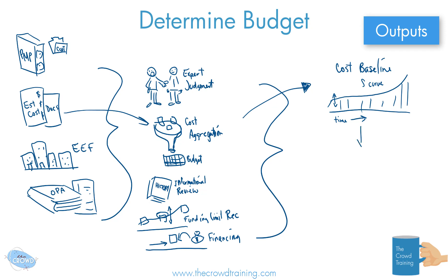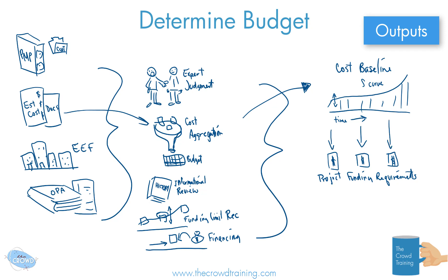Also based on this, we can take the plans and the baseline and figure out when and how we should expect or need to have the various different funds allocated to the project. We might look at what are those requirements — the requirements for funding of the project — and that all together is your project funding requirements as an output.